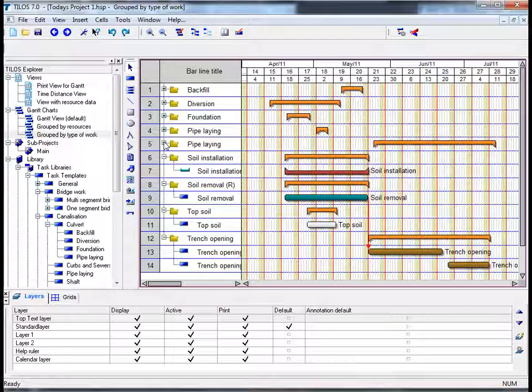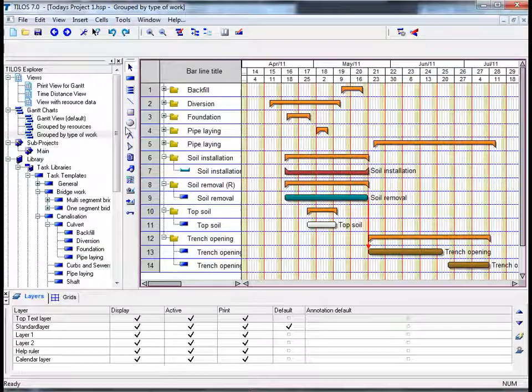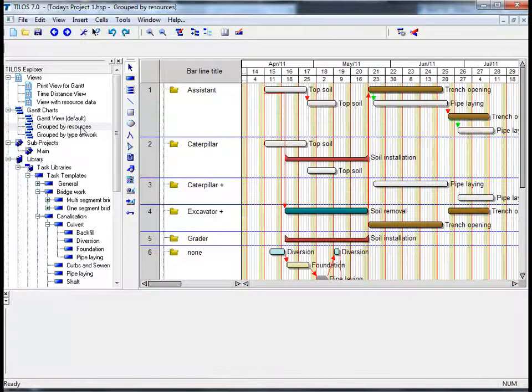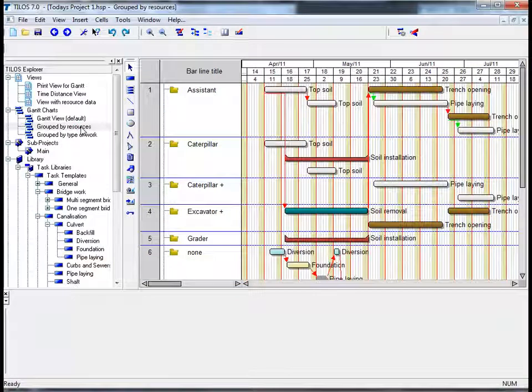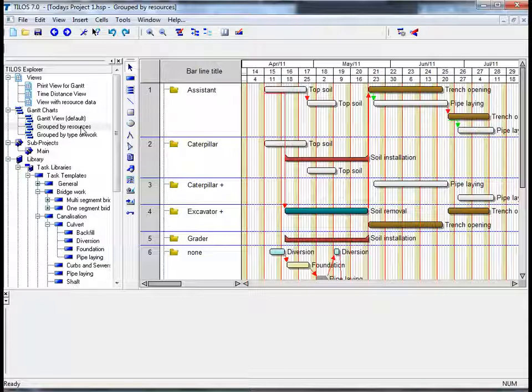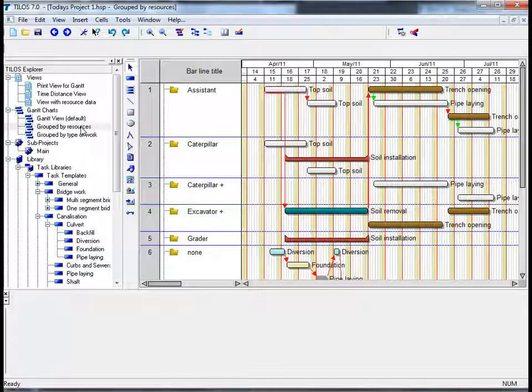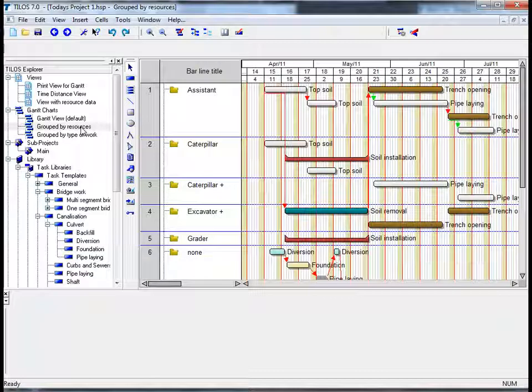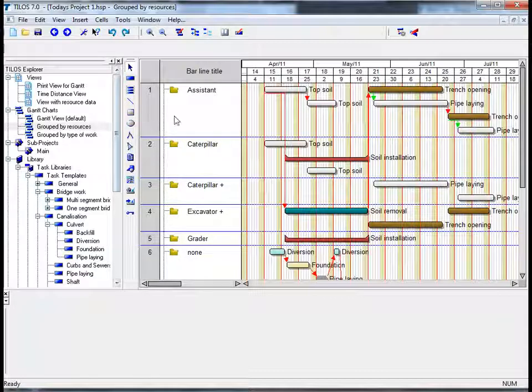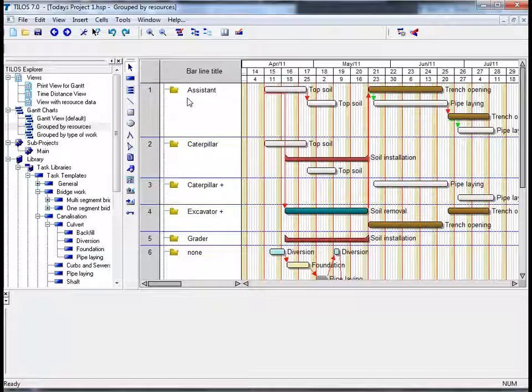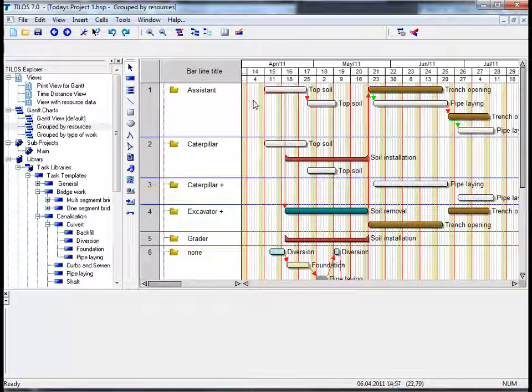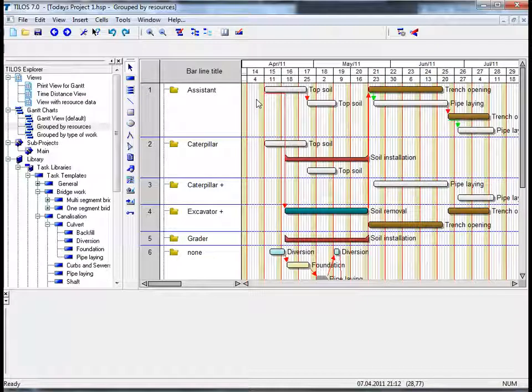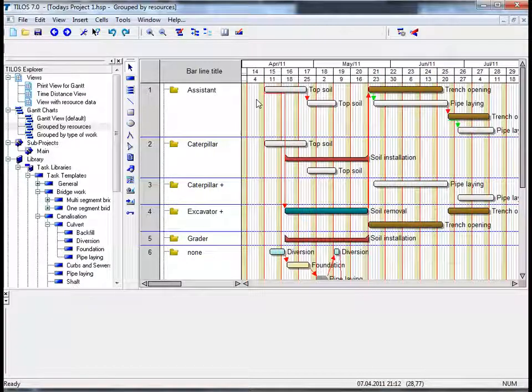Last but not least, if we click on grouped by resources, we can see here that we can display the assigned resources as a Gantt chart in order to identify where a resource has been assigned to. So, for example, if we look at the assistant as a resource, we can see that he has been assigned to a number of tasks, activities.